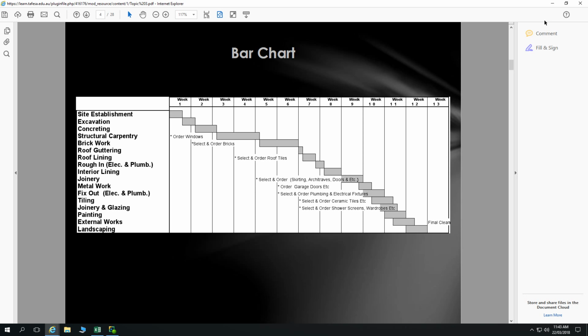You have to say, we're getting all the steel put in our trenches. I noticed you didn't come to see our trenches. Maybe you want to have a look at our trenches and steel at the same time. It's up to them whether they come out. Then they also have to be notified at framing. So once the framing has gone in, the council need to see that, the extent of the structural framing. And then that's it. That's all the notification you've got to give to council.